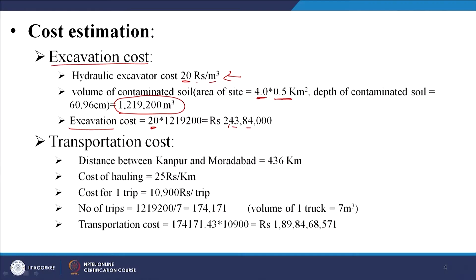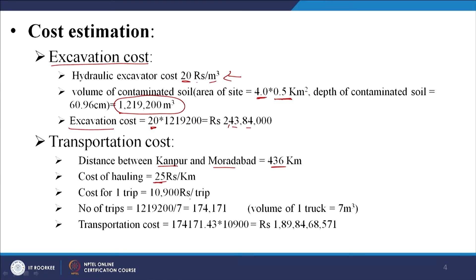The distance between Kanpur and Moradabad from Google Maps is 436 kilometres. Estimating that a lorry transporting soil costs around 25 rupees per kilometre gives a cost of 10,000 rupees per trip. Based on the volume of the truck, the number of trips required results in a total transportation cost of 1,89,84,68,571 rupees. Even if this is a slightly conservative estimate, cutting it by a factor of 10 or even 100 still leaves costs in the range of crores.